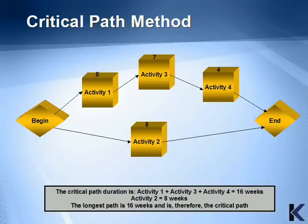This is a diagram of essentially the same calculation, except in graphical form. You can note that activity 3 is still dependent on activity 1 being completed before it can begin, and activity 4 follows activity 3. The calculation is the same — adding activities 1, 3, and 4 gives 16 weeks. Activity 2 is only 8 weeks long. Therefore, the longest path is 16 weeks and is the critical path.